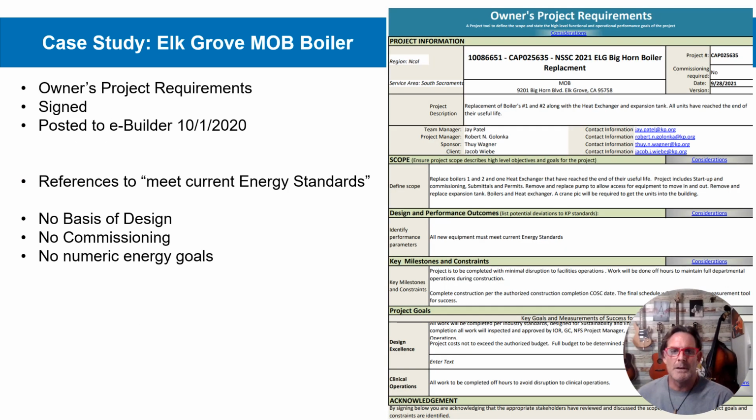And to jump right into the basis of design here, this basis of design has a little bit less. There's one reference on there that says to meet current energy standards, and that's kind of about all we get in terms of the mention of energy in the OPR. So no numeric goal, nothing like that. On this project, we did not have a basis of design. They never filed a basis of design. There was no review of the basis of design.